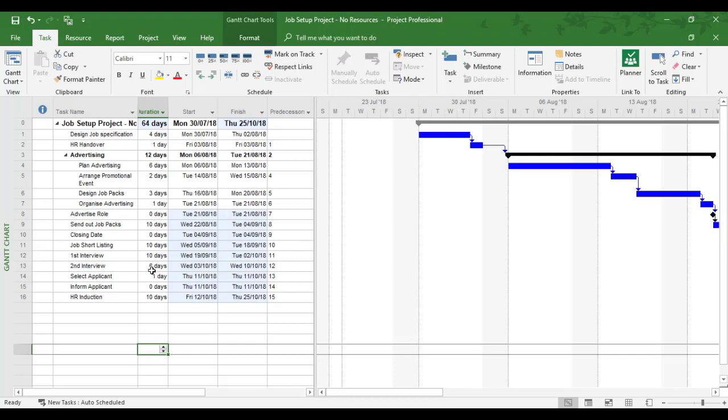In this example also, we're going to say that the design job packs and the arranged promotional event can happen at the same time. So that can be a start to start.